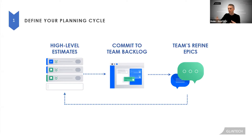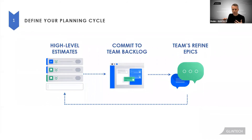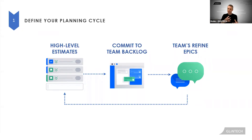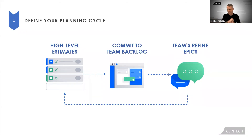Now let's say we've got a new initiative comes along. We think it's 200 points for argument's sake. We then break that into epics and we farm them out to the teams that are doing the work. They'll appear on the team's backlog and they're on board. It won't be a surprise to them because we'll have had a conversation about it first. One of the first things I see that goes out the window sometimes is when you have a process and technology to be able to put work out like this, people stop talking to each other — and that's not the case. It should just support the process, still have the conversations.